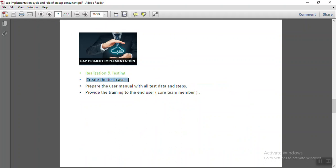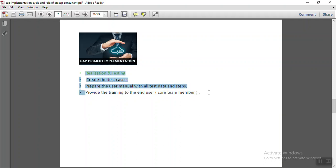They create a testing program, prepare test cases, and develop user manuals. According to the user manual, the core team members undergo complete training. The functional consultant arranges a training program for all core team members of each module — FI, SD, MM — because every ERP software has different processes that require detailed knowledge.